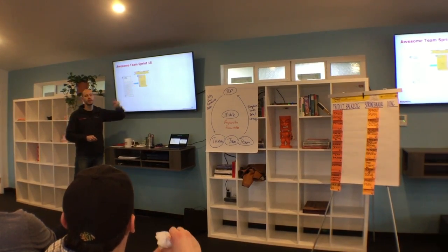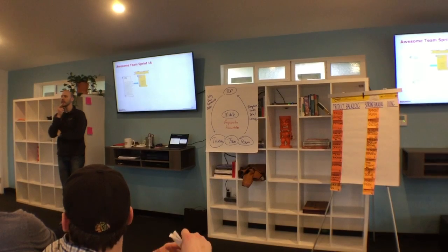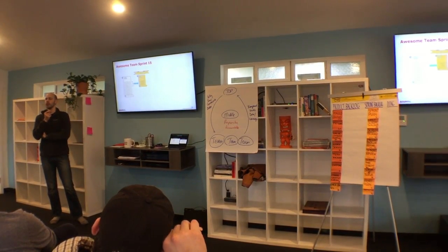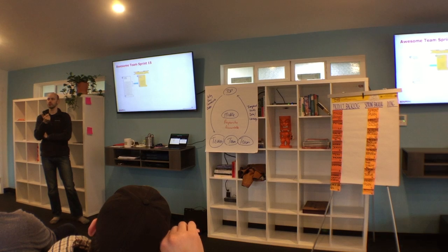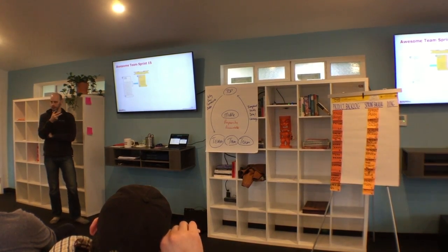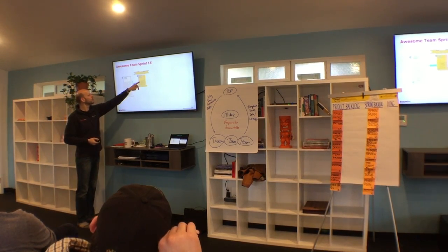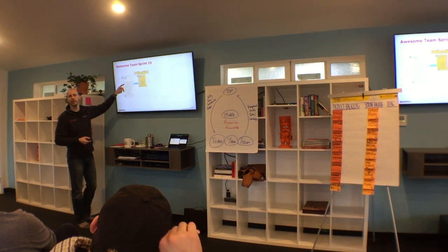The product owner then looks at the sprint backlog and says, will that achieve the sprint goal that I would like? Will that create the demo I want to see and my stakeholders want to see to reduce risk, get people excited, and teach us something about the product or service or whatever it is we're building. The product owner then will dynamically make trades from the sprint backlog and the product backlog with the team's help.